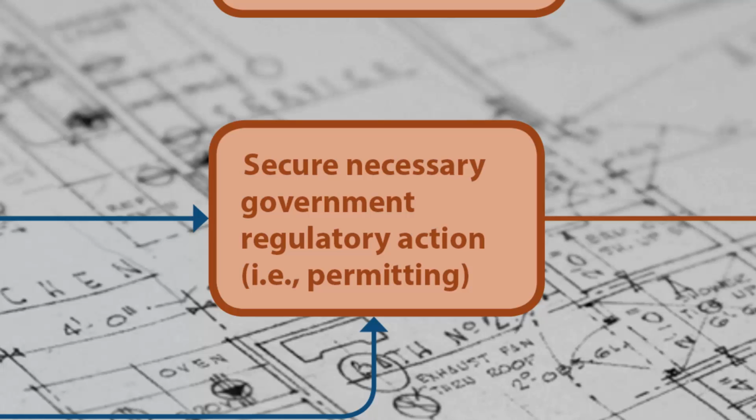As the project moves closer to the final go, no-go point of closing, the developer will submit formal applications for needed government approvals. This usually involves various zoning reviews, site plan approvals, and so on. Depending on the project and the area, this may involve a series of other approvals, often from multiple layers of government. For example, zoning and site plan may be under the purview of the city and its planning commission, while various incentives or public financing approvals may come from quasi-independent boards or authorities.